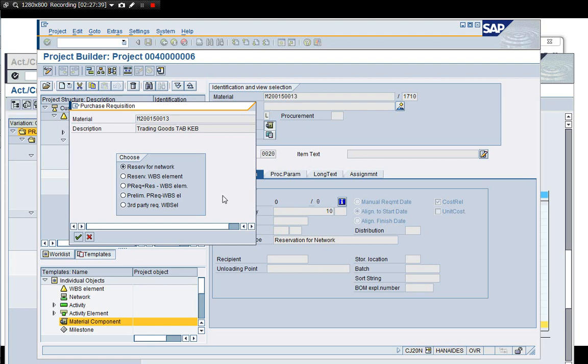So the setting was not right, and the meaning of this is that it is for external procurement material. So the last 3 lines we have here. If it is an in-house production material, you only have the first 2 lines, and the third tick allows you to create the purchase requisition. And if it is in-house, we have to have this WBS to use a project valuated stock.